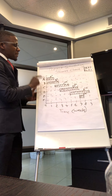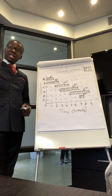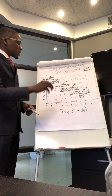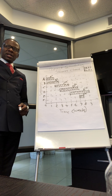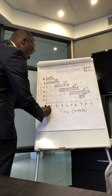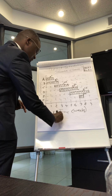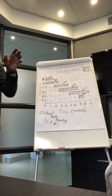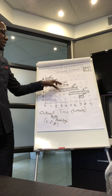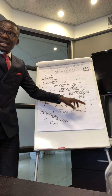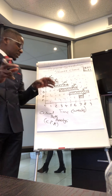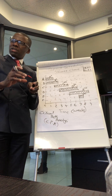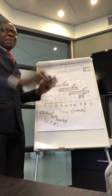That is the main use of a Gantt chart — it helps you with planning, organizing, coordinating, controlling and directing. The organizing part talks about allocation of resources. This is where we get something called Critical Path Analysis, or CPA. In a Gantt chart, some activities or deliverables are more critical than others. A critical activity is an activity which must not be delayed, because if it is delayed it will delay the whole project by that same amount of time.